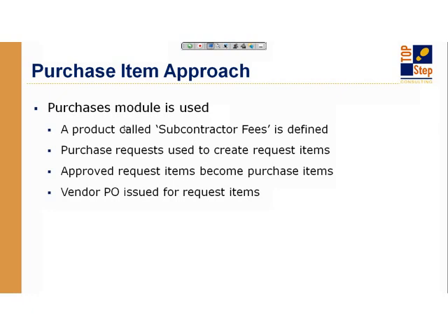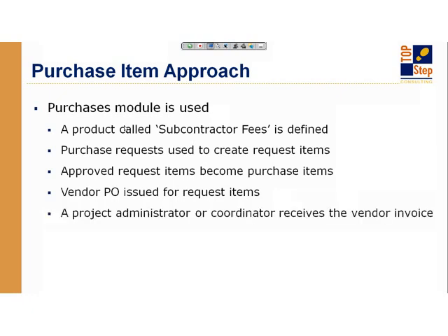So that is obviously a much more involved process, even as I mentioned it. Think in terms of what we just talked about, expense reports. I create an expense report and submit it, the accounts payable person or maybe the project manager reviews and approves, but there's really no one else involved. A purchase request involves the creation of a purchase request, the submission of that, perhaps the review of that by another person or procurement. Procurement then creates a purchase order to actually complete the process, and then tracks the fulfillment of that process. So the fulfillment is tracked when the vendor invoices the company. Okay?